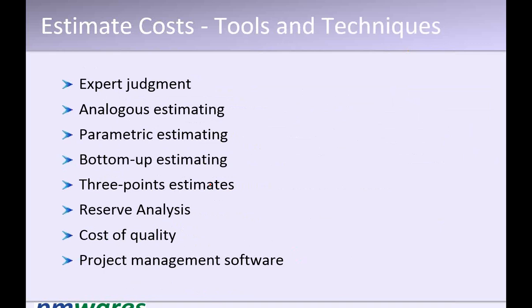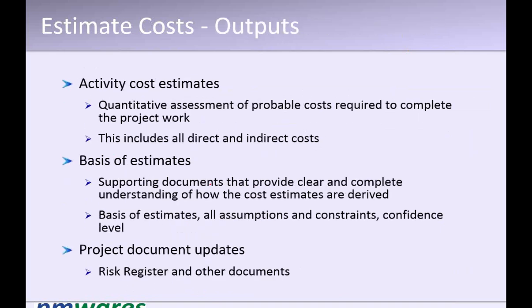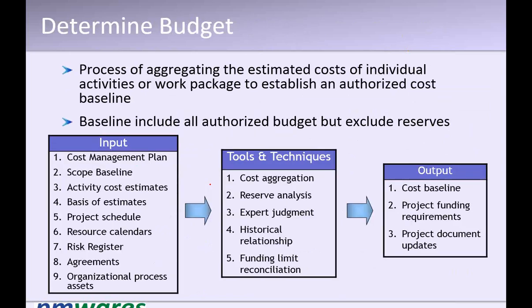Using these techniques, you work out estimates of each activity, which gives you the cost of each activity. The basis of estimation, meaning whatever assumptions, constraints, or basic data you have collected on which you have estimated the cost, should also be part of it as a supporting document.